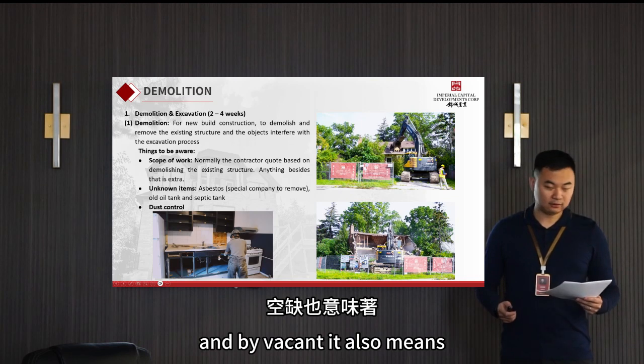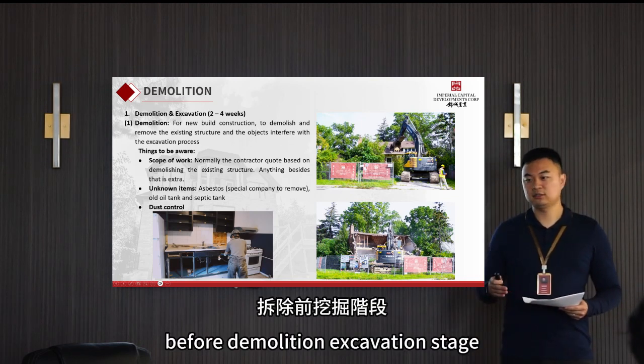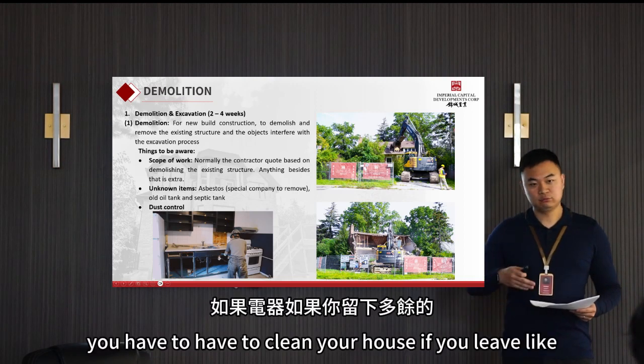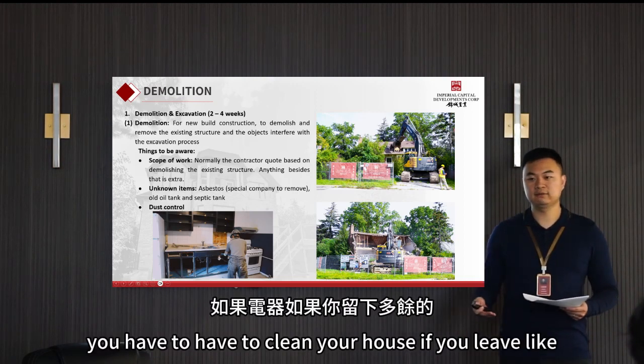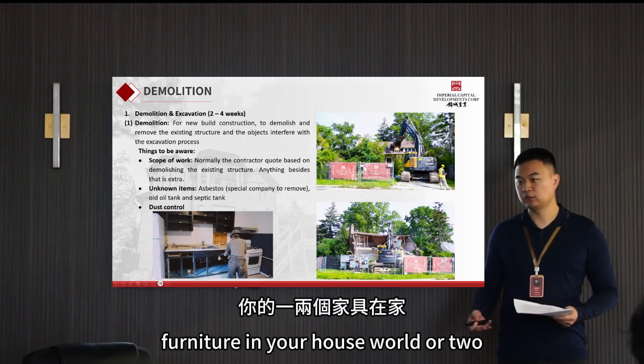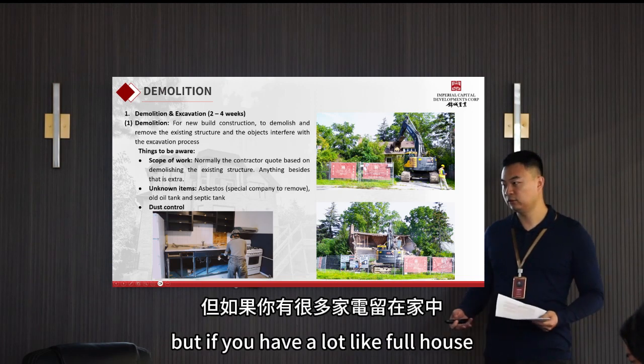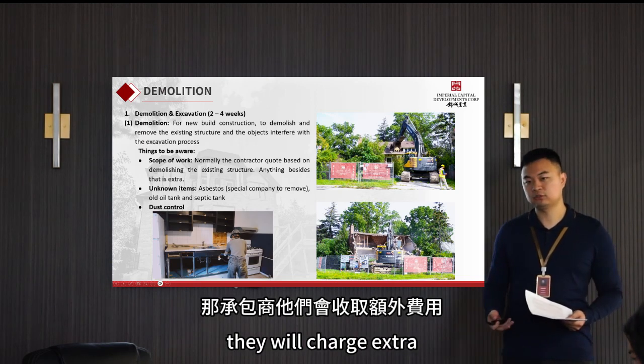And by vacant, it also means that before the demolition and excavation stage, you have to clean your house. If you leave appliances or extra furniture in your house, 1 or 2 items, the contractor will look after it. But if you have a lot, like a full house, they will charge extra.